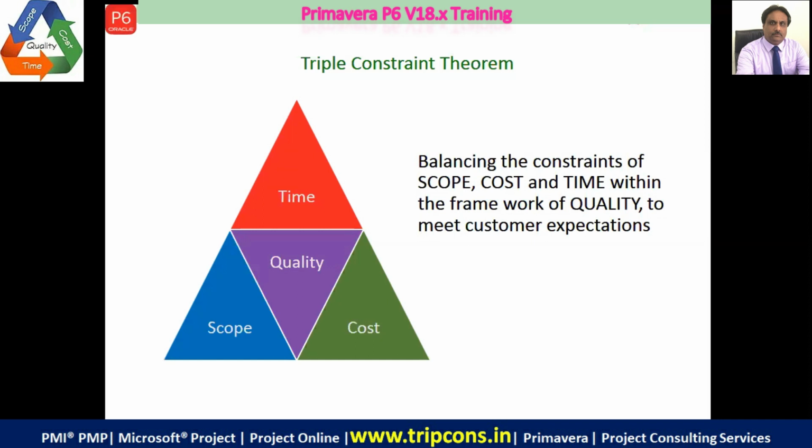Okay, so that's what we do in the beginning. Before we undertake a project, we do a feasibility study of time. We do a feasibility study of the profitability, the difference between price and the cost. And if it is possible to complete the scope and achieve the quality or meet the expectation, then we go ahead with the project. So that's how we work commercially.